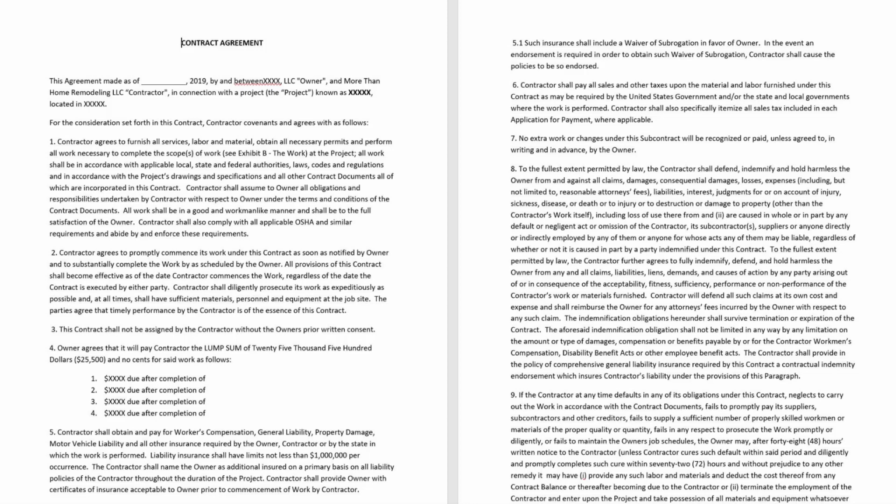So the contract is really the boilerplate of a lot of the corporate level agreements. And the scope of work is really the down and dirty into what it is specifically you want done. I usually break things out by either trade or scope. If it's a general contractor, I'll usually break it out by room and just list everything. But if it's a certain trade, I'll still sometimes list it out by room, but it's truly dependent on the scope and so forth.